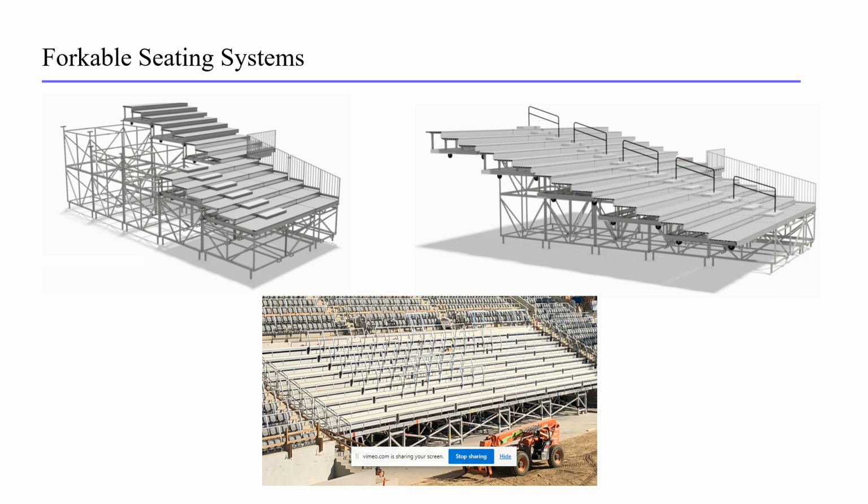This type of system requires the most upfront design and engineering, as concepts like wind loading, dynamic loading, and storage logistics, probably the most important concept to consider, need to be worked out well ahead of time with all the project stakeholders, especially the facility managers, to ensure that the project is costed correctly upfront. No details should be missed that may derail a project or cause the system to be virtually useless or very, very expensive to use if you don't talk to the facility people early on, and that can last into the life cycle of the equipment.